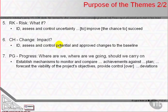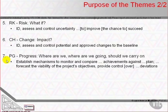The last of the themes is the progress theme, which asks: where are we, where are we going, and should we carry on? The progress theme explains the decision-making processes for selecting stage boundaries, defining tolerance limits, approving plans, monitoring achievements, and using the registers and the process to trigger escalations for events outside of tolerance from planned performance.